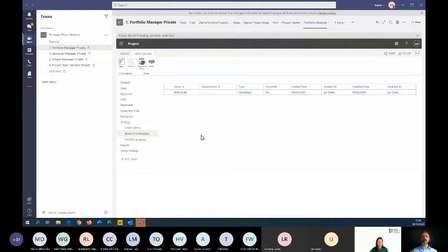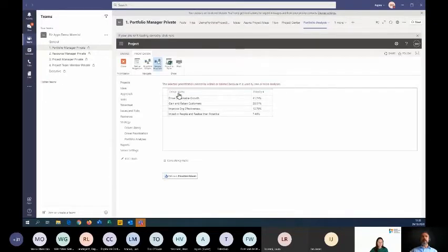Okay, so basically we've created a prioritization, including all of the drivers that we've just shown in the previous screen. So you can see here the list of drivers. Ian has included 4 in the prioritization. And what has happened is each driver gets a priority score, relative to all other drivers in the list.